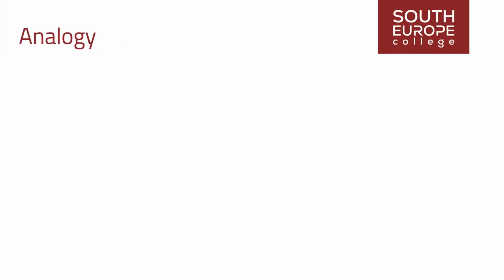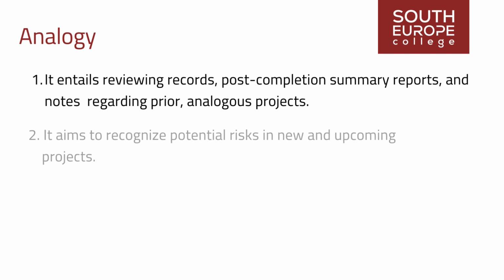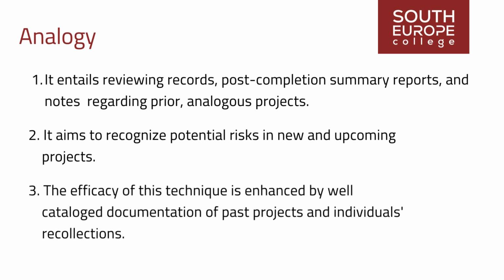The analogy technique entails reviewing records, post-completion summary reports, and notes from project team members regarding prior analogous projects. This process aims to recognize potential risks in new and upcoming projects. The efficacy of this technique is enhanced by comprehensive, accurate, and well-cataloged documentation of past projects, coupled with the quality of individuals' recollections.